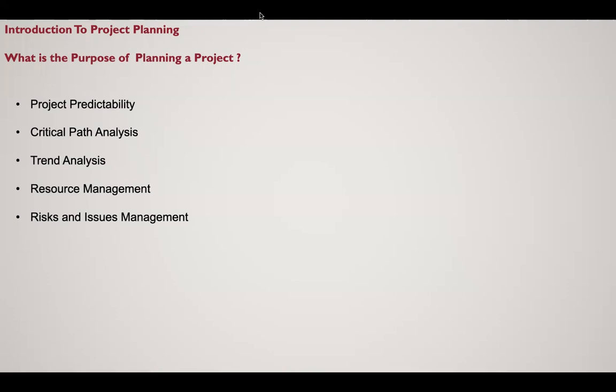However, when it comes to a big project, you could have some people they call principal contractors. If you have a big project, the first person by law to appoint in writing is a principal designer. The principal designer could be a company like Jacobs, a big design house. Jacobs will say, okay, we've got this project, we need designers. It could be an in-house designer, or if it's a big project, he could employ other designers to join him. But Jacobs, for example, will be the one coordinating those other designers.